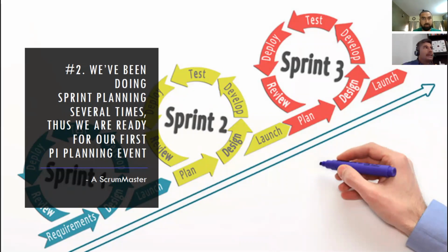So please, and here is very important, and I agree with the Scaled Agile team on this, it is key to prepare for a PI planning. First, you need to train on what is going to happen in the PI planning. Especially if you are starting, please don't start executing the PI planning right away. Ideally, have a 2-day training, like Leading SAFe for all the team, or SAFe for Teams for all the team. If not, bring an experienced SPC, an experienced trainer that can bring you a simulation of a real PI planning.